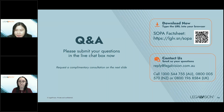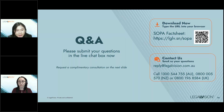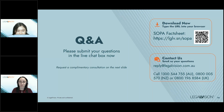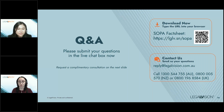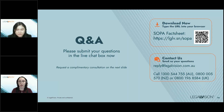Question: The Australian home building sector has many issues with delays, non-compliance, poor workmanship, and bankruptcies. How does the Act and process prevent tradespeople from exploiting the system? In terms of delays, non-compliance, and poor workmanship, these can be incorporated into a response to a payment claim — essentially a payment schedule. There may be a basis under the payment schedule and in the contract to rely on to deal with those issues, such as offsetting amounts or liquidated damages to offset any payment claim.